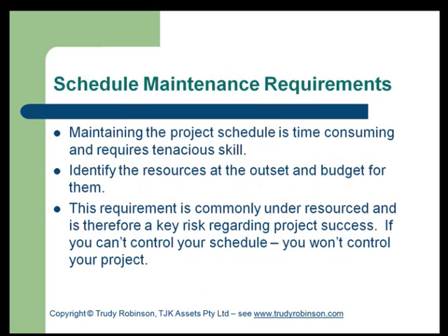We need to point out that keeping the project schedule up to date is a time-consuming exercise, and it does require a specific skill. If your project is complex and ongoing for a period of time, you must ensure that the resources who have the skills and the time are identified at the beginning of the project plan, and ensure that the budget is set aside to pay for them. This requirement is commonly under-resourced, and the project manager is expected to be the project administrator as well. Ensure you receive and have access to project administration support as you require.